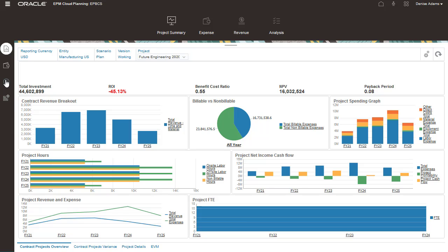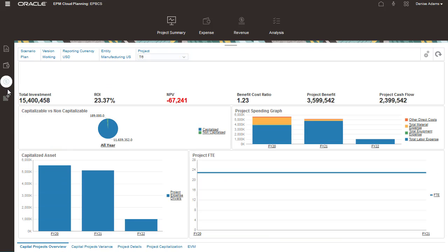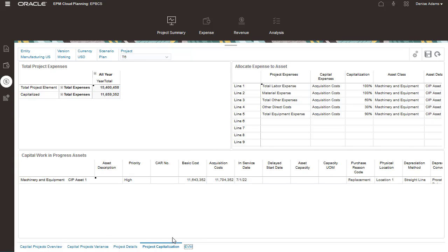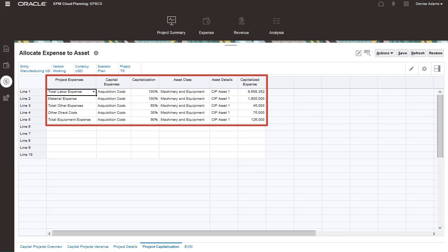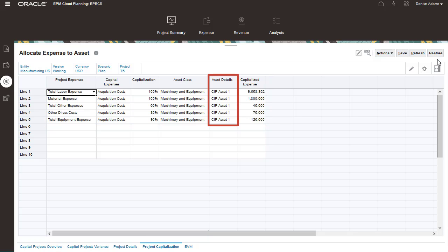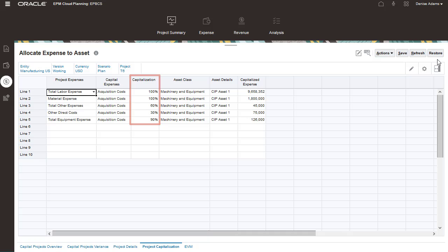Now let's review capital projects. When you work with capital projects, you can review all the associated costs together on one page. You can allocate costs to specific assets. It is here that you plan for the assets that are part of your project. You can allocate project costs to one or more assets, and you can either fully or partially allocate costs for those assets by specifying a percentage.